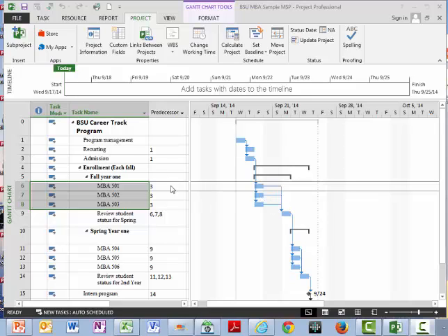As we go back and remember what we had in the Excel workbook, we had these task descriptions. Remember we talked about indenting those tasks to build a better flow. Here, remember the predecessors we had from the workbook? Here they are again. And look what happens when we have what is called a tracking Gantt, and we have developed a flow of those. We have not added time, we've not added people, but that's the first step to get there. That's what it's going to look like as we move your information over to Microsoft Project. So Microsoft Project is coming, a very good tool, but let's take the time and build up the skills to get there.